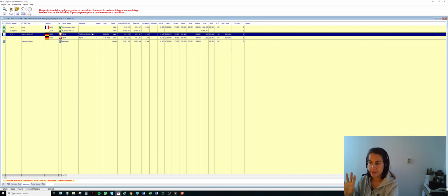The reason is that in this screen, ECOS tries to retrieve the ITTs with their related tenders, and by using the key reference numbers that we enter in the system, ECOS is able in your BCK directory to find the matching tender file related to its ITTs, because now we've created an ITT and we are giving back a tender answer.